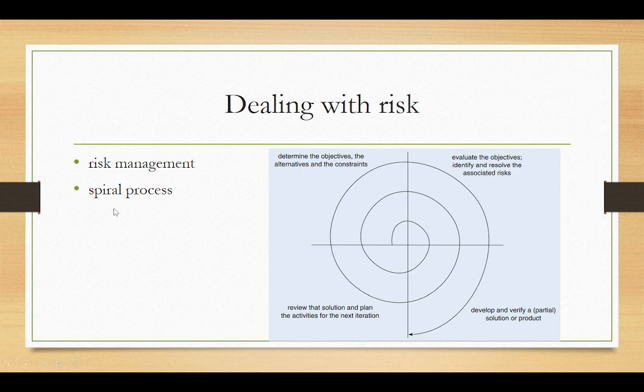In a typical project, the major risks are around the requirements. Do you understand them? Have you got them all? Are they changing too frequently? Anything that you can do to increase your confidence that the requirements you have are both necessary and sufficient can reduce the risk of project failure.